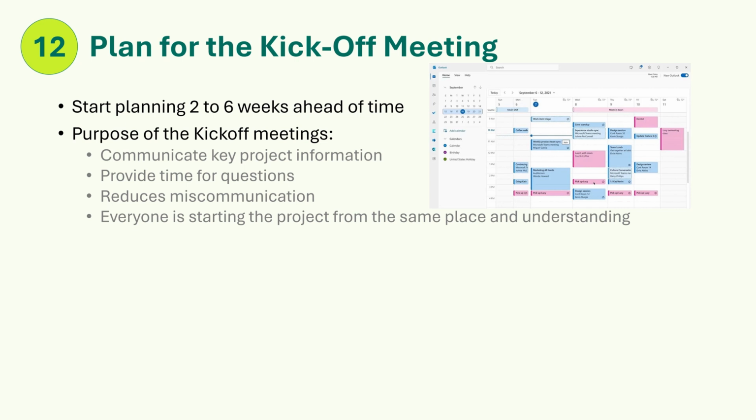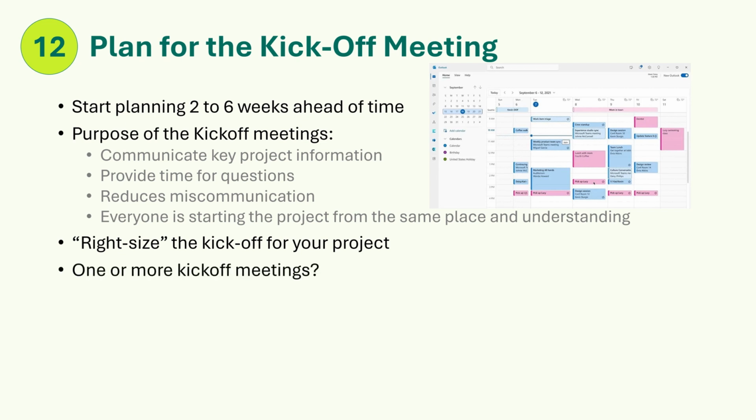Without a kickoff meeting, team members and stakeholders could have misaligned project expectations, which leads to scope creep and budget overruns. You should right-size the kickoff for your project. You may choose to have multiple kickoff meetings, one internal to WSDOT staff, another when consultants are engaged, and possibly one or more with external stakeholders.